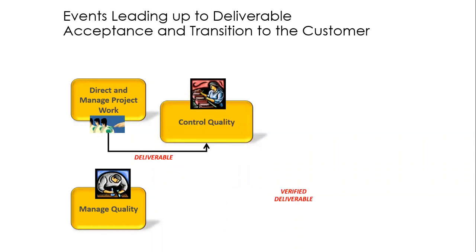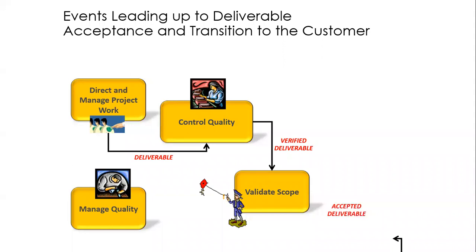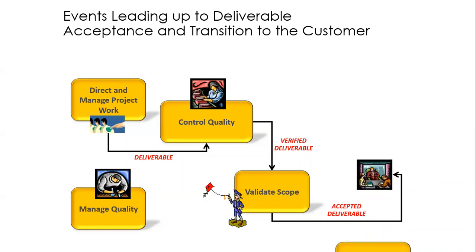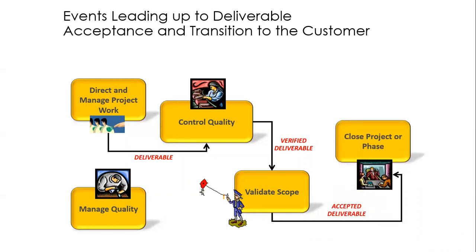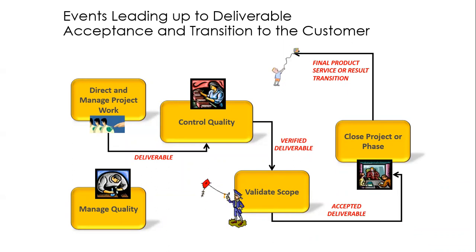As usual, our deliverable gets checked. Assume it passes the test — we get a verified deliverable, it goes to validate scope, tested by the customer. And this time, assume the customer is happy. We get an output known as accepted deliverable. That accepted deliverable goes to close project or phase. This is where you're closing out either the project or phase. The major output you get as a result of this is final product, service, or result transition. Also remember that you do get a final report. This is the most direct effect of an accepted deliverable going into close project or phase — you need to transition that deliverable.